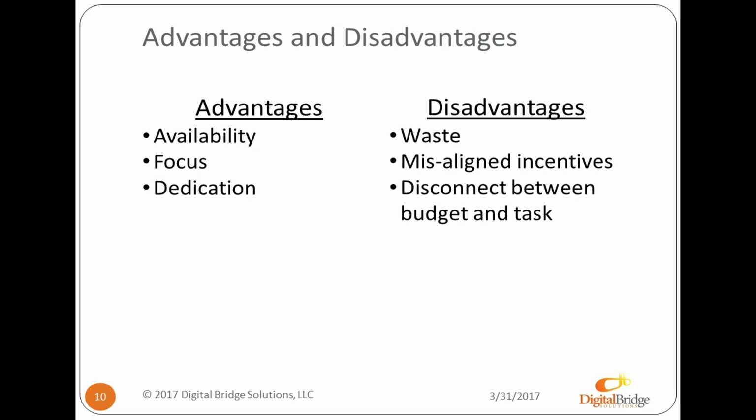And there's a disconnect between budget and task, right? So you've estimated this 6-week project, you've kind of thrown 40 hours at it for each resource, but you're not necessarily aligning those 40 hours to a given task that those resources are supposed to get done every week. So if they do get that task done, great. If they don't, they're still out there for 40 hours, and now you're going to end up stretching out that timeline and impacting the budget. So it's not necessarily task-oriented in the way those models are built. One comment here from a developer project manager experience is, are you familiar with Parkinson's law?